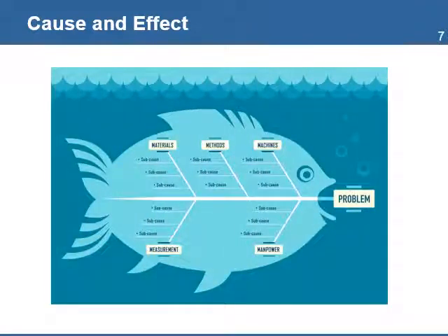The fishbone diagram identifies many possible causes for a problem. It can be used to structure a brainstorming session. It sorts ideas into useful categories. For example, this chart shows 5 categories for the major causes. Under each category, the project team will identify sub-causes. When it's complete, the list becomes the basis for diagnosing the root cause of the problem.